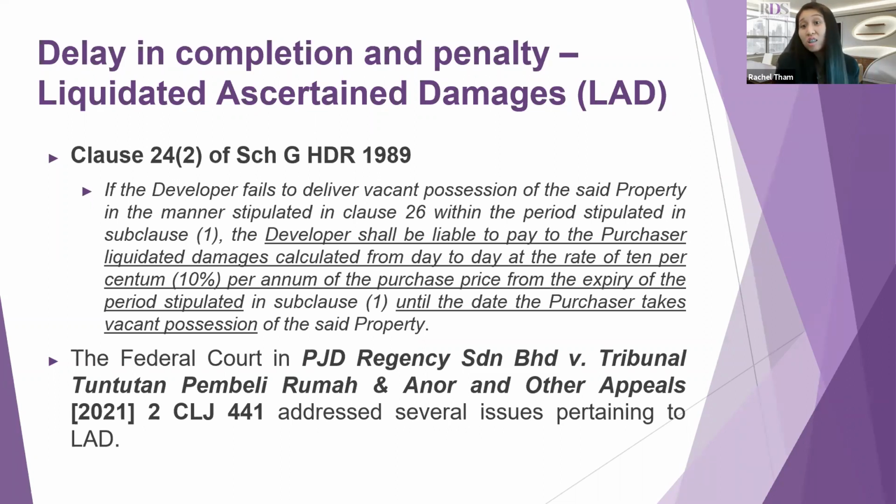So pursuant to clause 24.2 of Schedule G HDR 1989, if the developer fails to deliver the vacant possession of the property within the stipulated time, the developer shall pay the purchaser liquidated damages calculated from day to day at the rate of 10% per annum of the purchase price from the expiry of the period stipulated until the date the purchaser takes vacant possession of